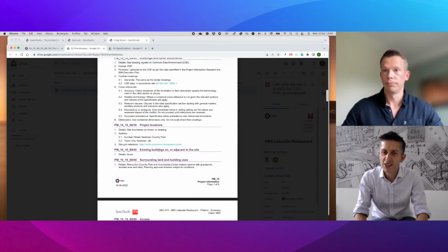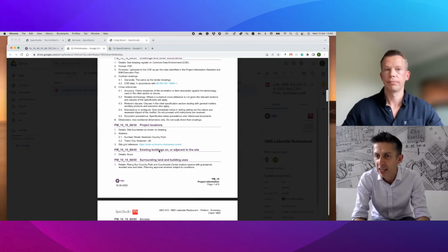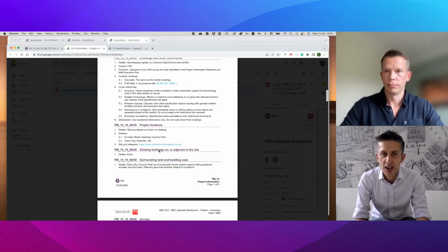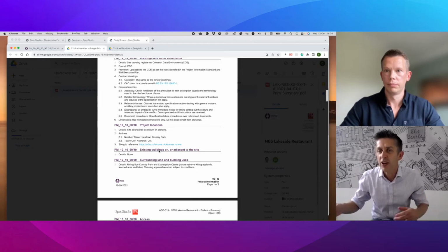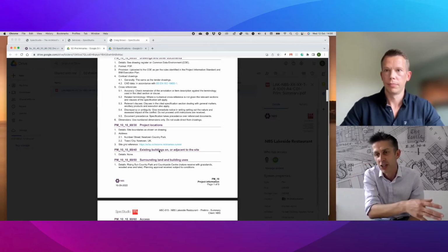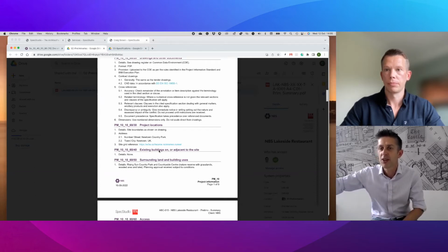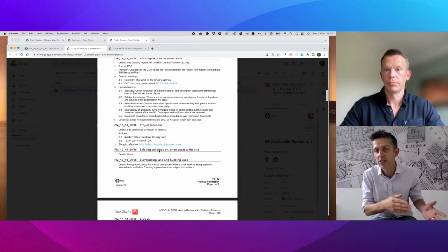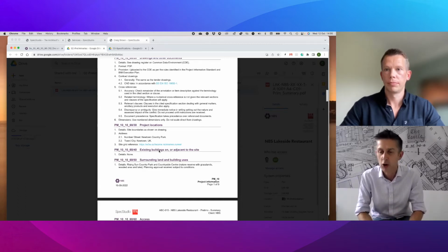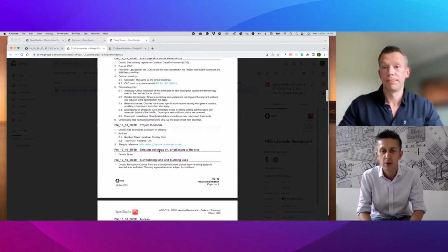Yeah, and this is just a sample project, so we've just used Google Drive there, but in real life it would be like a proper extranet, BIM 360 docs or what have you. And what's interesting, I remember we had the conversation about the prelims, and if you were the main contractor, you'd want to see all of the prelims and the contract clauses, but a specialist subcontractor might just want to see a subset of the prelims. And I think the way we talked about that was on the extranet there, you'd control the permissions in terms of the main contractor's team can see the full prelims, whereas the specialist subcontractor could see what you've got open at the moment, which would be a few sections from the prelims.